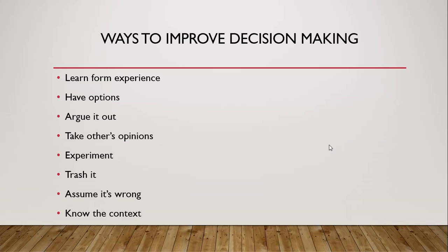Experiment. There is no better way to gather strong evidence to help with a decision than a well-designed experiment. One experiment is worth 1,000 theories and projections. Try solving the problem quickly, and see what happens. An experiment is really a way of testing your decision with well-contained consequences. In the project world, we have pilots and prototypes. They have another advantage for us. Stakeholders love them. They engage people and help us gather feedback and build support.